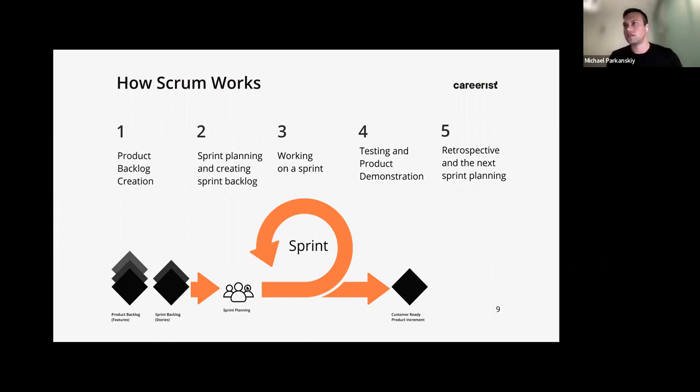At what stage are the test plans created? Which stage will the test cases be written? So the test cases are written, in my experience, and most likely in yours, when you get the PRD. As soon as you get the documentation from your product manager, you already know what's going to be built. You can already start writing test cases. That's the time that you write test cases.